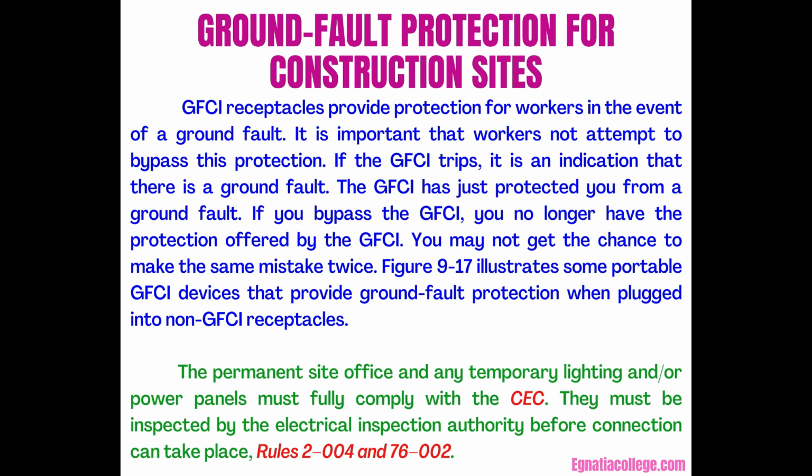This figure illustrates some portable GFCI devices that provide ground fault protection when plugged into non-GFCI receptacles. The permanent site office and any temporary lighting and/or power panels must fully comply with the CEC. They must be inspected by the Electrical Inspection Authority before connection can take place, Rules 2004 and 76002.